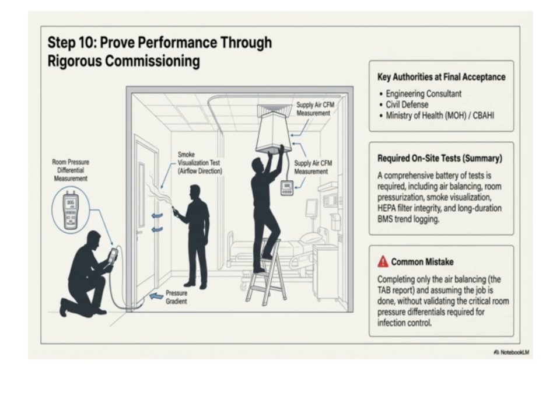It's important to remember that final acceptance of the system isn't just about passing these individual tests. The approval comes from several authorities, including the consultant, civil defense, and the Ministry of Health. Their review ensures that all safety and compliance standards are met comprehensively. And let's emphasize that performing TAB alone isn't the ultimate proof of safety. It's a vital step, but it must be complemented by thorough inspections, documentation, and approvals to truly confirm that the system is safe and operational. This holistic approach is key to ensuring the safety and effectiveness of the entire environment we're working to create.